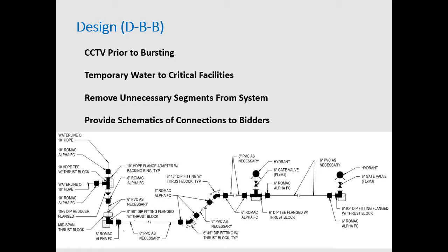Trust me, yes. Because it's going to help everybody, between the inspectors on site, you and us, when we go back and we're looking at figure A, and we can say, well, this hydrant moved 50 feet east, and so we had to change these fittings. Okay, got it. Makes sense. So